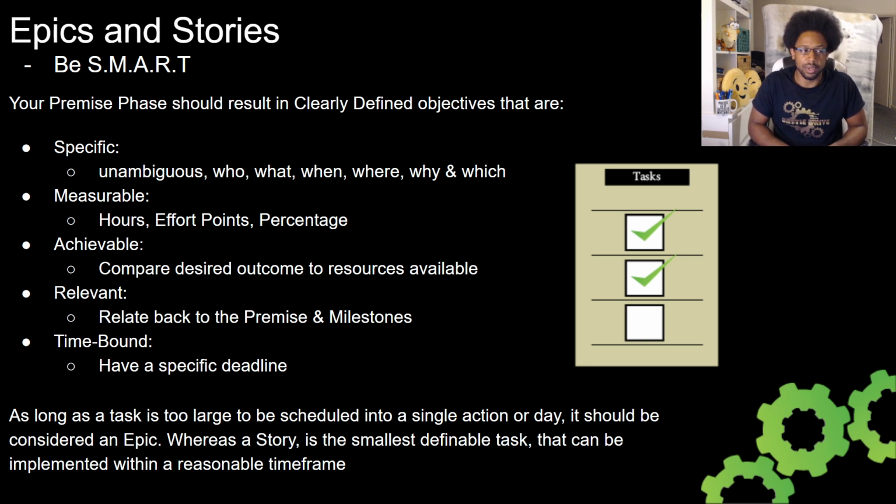If you're unsure, or if you think it will take an hour and a half, you round it up to 2 hours, then you add the additional hour on top. So if you think it will take an hour and a half, you assume it will take 3 hours, because you round it up to the nearest hour, then you add 50% as your deadline.